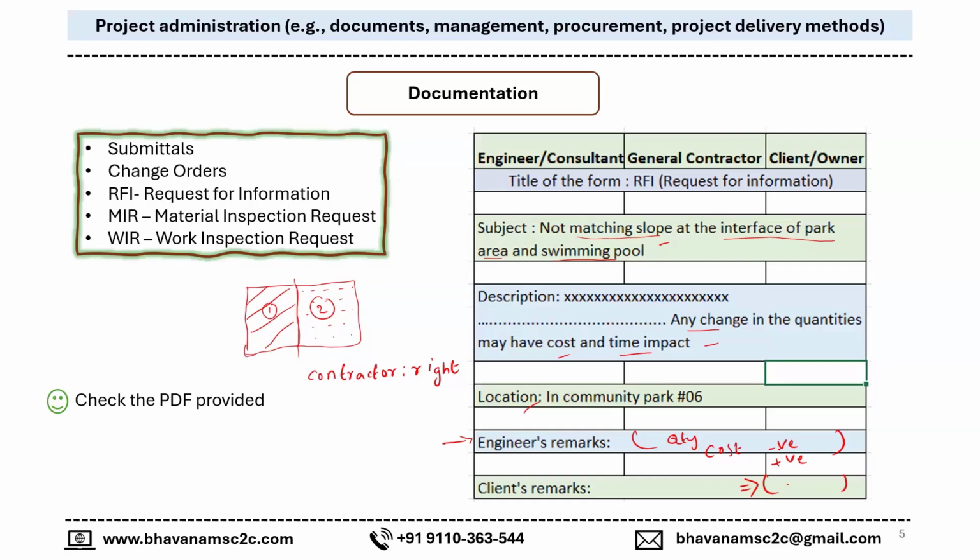Later, I may think that due to the existing surroundings of my house, my swimming pool may get polluted, and I would like to cover it along with the construction. But the covering was not decided by me at the start of the project. So a change order basically comes from an owner if the owner thinks they require some change in the project. I hope the difference is clear, right?